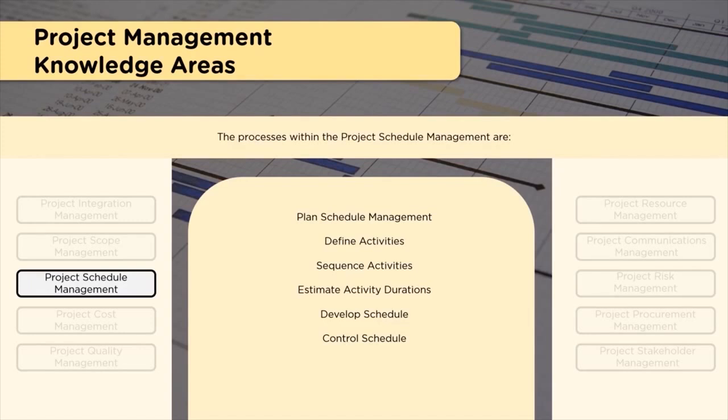So likewise, we look at how many resources we have, what effort is actually involved, and then what is the duration within which we need to complete it. Either you look at how many resources I have and based on that look at the duration, or I will look at the target date. Mainly the target date is given by customers, as you discuss, when the project needs to be completed. Accordingly, you may need to acquire the resources.